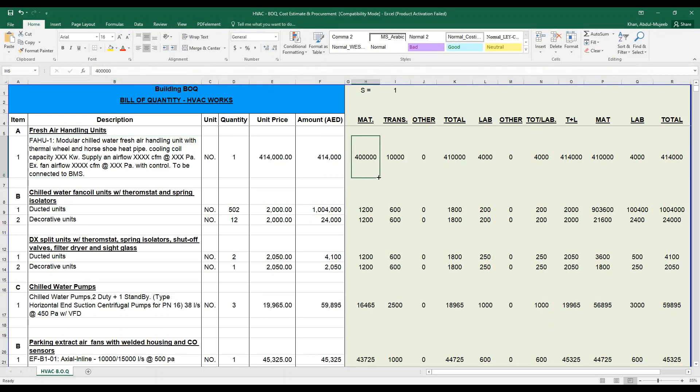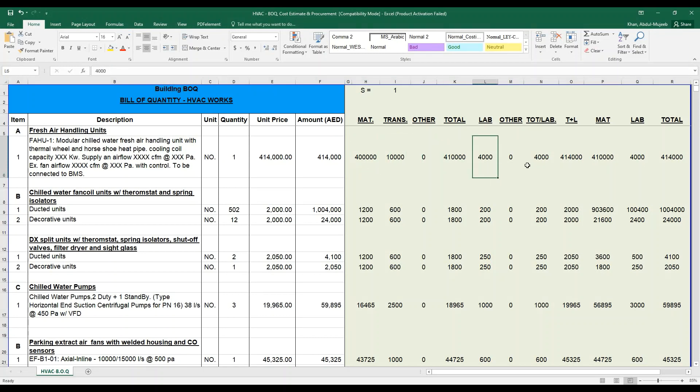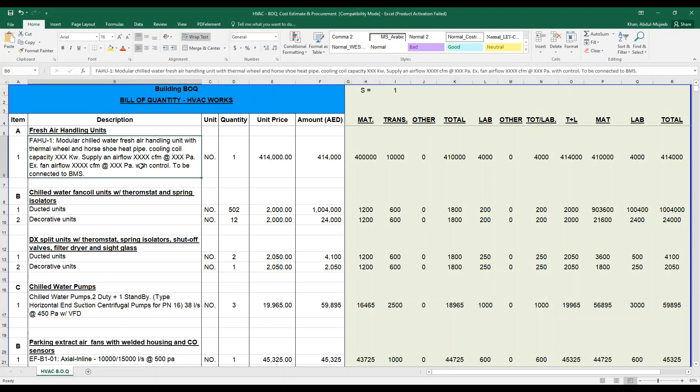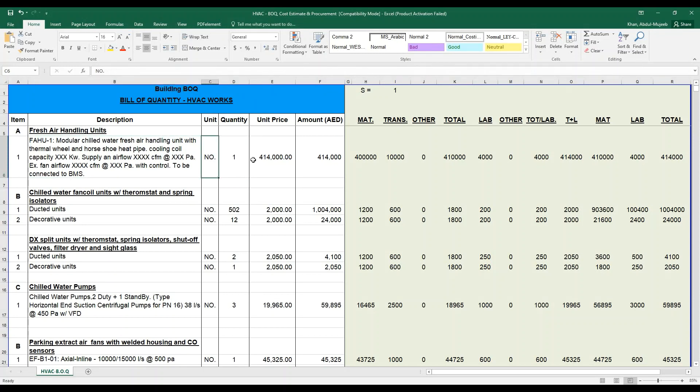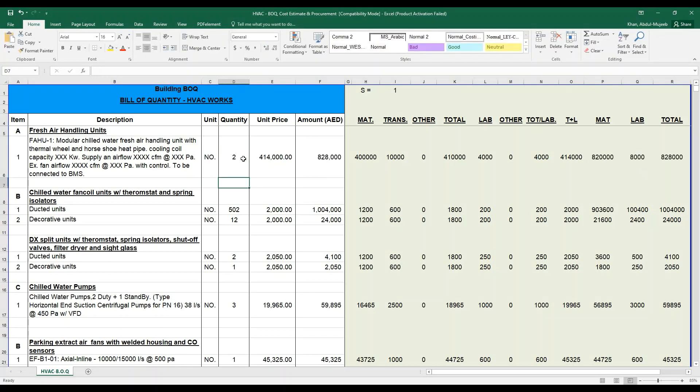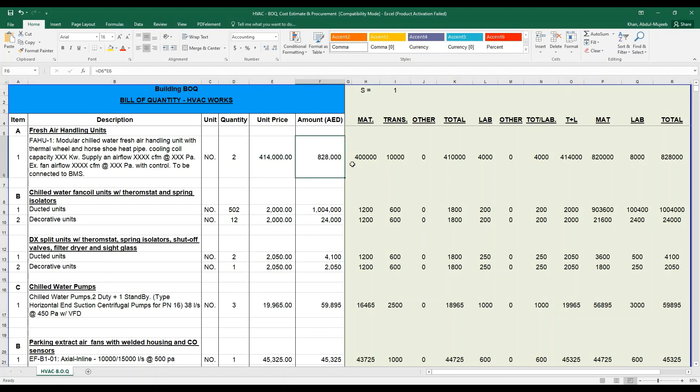For example, the main actual total of a fresh air handling unit, I have put here 400,000, the transaction cost, the total cost, the labor charges, and the other charges. For a quantity number one, because this is a main unit, the big unit, it is derived in numbers. If you change the number of quantity over here to two, then the amount will be changed based on the calculated request.